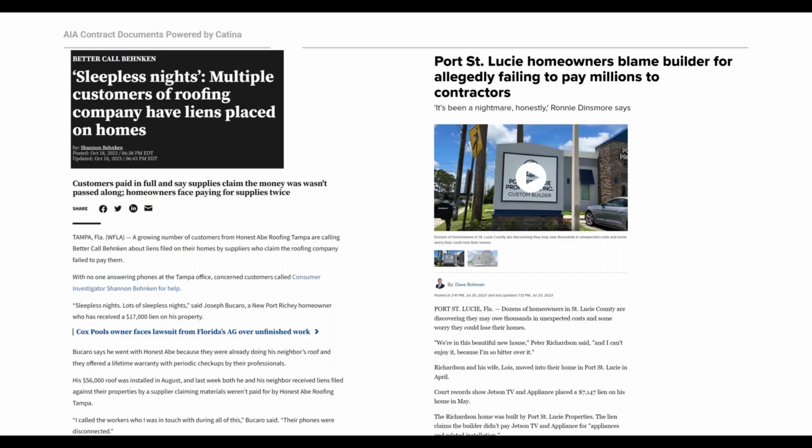So it came as a surprise that they had paid their general contractor, but the general contractor had not paid their subs, and then they were hit with a lien claim as a result. So in other words, what happened was that the owner never got the appropriate lien releases from everyone who did work on the project to protect itself. So a couple of takeaways: this kind of stuff happens all the time.